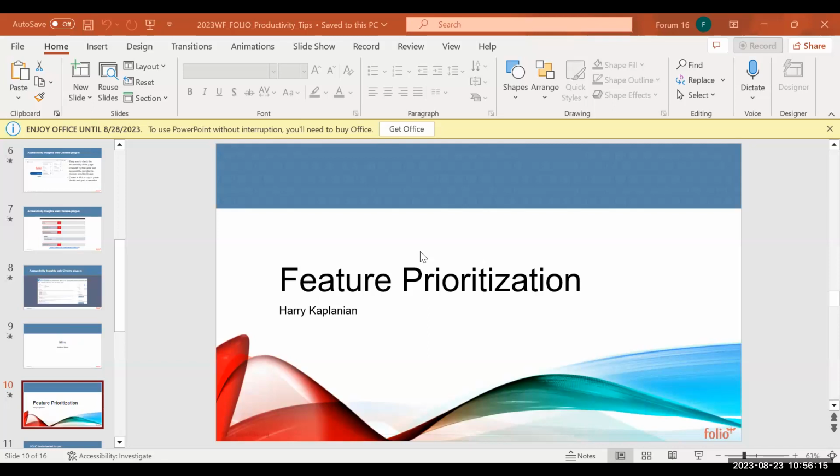Okay, and 1 is the minimum. It's the smallest it can be. Then as you go through this feature list, the values follow the Fibonacci sequence: 1, 2, 3, 5, and so on. In a sense, these are almost multiples of each other. So this feature has twice the value of this feature, and this one has 3 times the value.